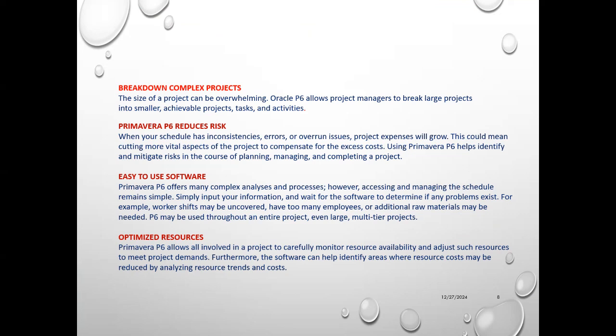The answer is yes. Using Primavera, you will be able to do the proper risk analysis, and after the risk analysis, you will be able to add some contingency reserve to the project in terms of time and in terms of cost. That means the project schedule or the project budget you are going to create for this particular project is going to be a realistic one, because you already consider all the factors. On top of that, you also consider all the risk involved in that particular project.